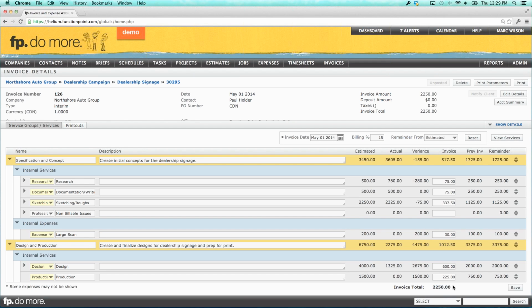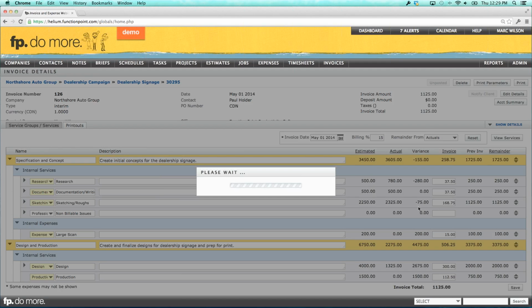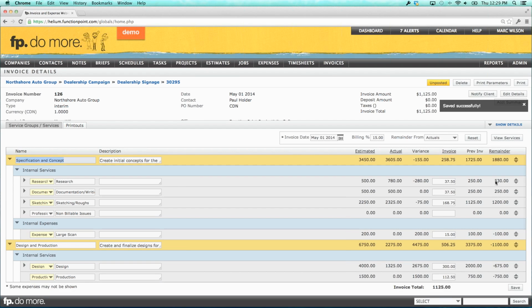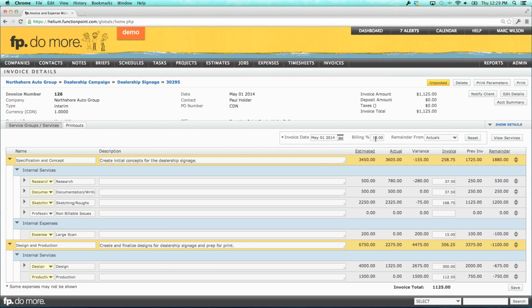If you say, well, I really need to bill the client for all this extra research work that we did. We have $780 here. We've already invoiced $250. I can calculate the remainder and drop in that remainder from actuals if I want to. The remainder from actuals is $530. So maybe I decide, we're going to bill 15% of estimated, but I really need to bill them this $530 for research.